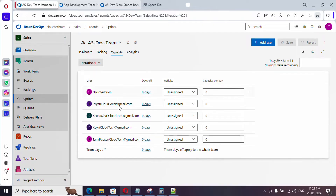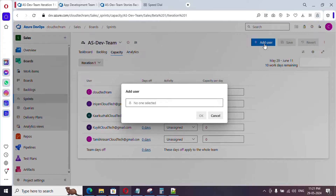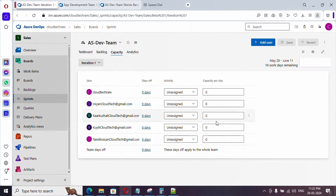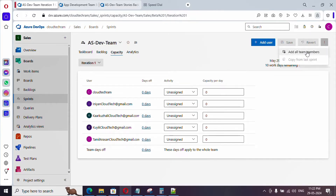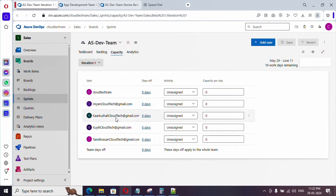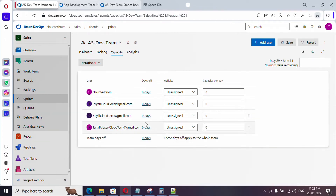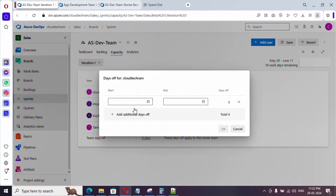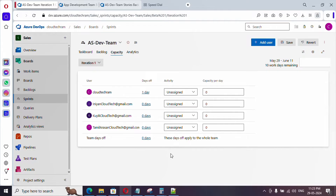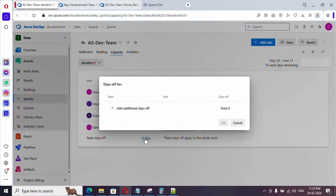Now let's do capacity planning. Click on the Capacity tab and you'll find the list of users for the team. If someone is not showing up, click Add User and type their name. If you have more users and can't find them, click Add All Team Members, which adds every member of the team. For the dev team all members will get added. To remove a user from the sprint, simply remove them. You can also set Days Off for individual users — for example, if a user is unavailable on the 31st, select the start and end date and click OK.